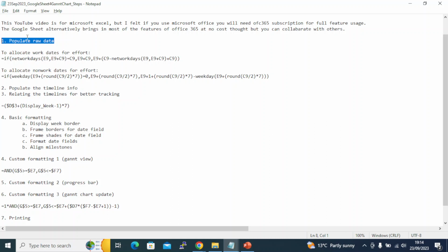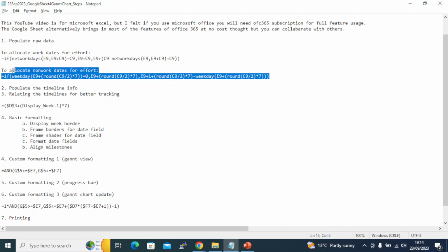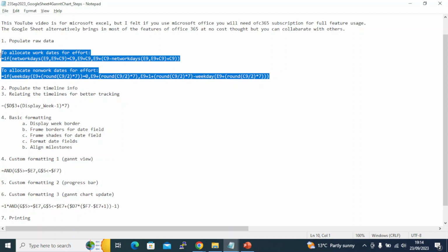And I have added some values to the original video wherein I calculated the end dates using some formulas. I have used workdate and networkdays, weekdays, all that together in the formula. So what does it help? When I'm going to show you a real project, I have few tasks I can only do during the work days, and few tasks I can do on all days, and few tasks I can only do during the weekends. So I need to calculate from the start date how many days it will be away, my end date, based on these conditions. So I have some value-added formulas here. These formulas will all be posted in my blog, you can take a look.